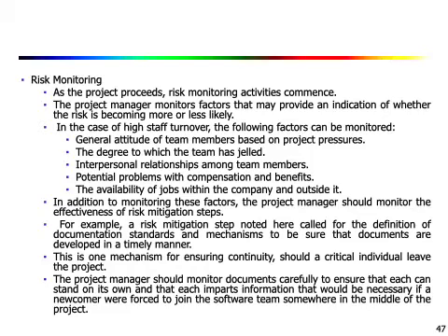This is one mechanism for ensuring continuity should a critical individual leave the project, and the project manager should monitor the documents carefully to ensure that each can stand on its own and that each imparts information that would be necessary if a newcomer were forced to join the software team somewhere in the middle of the project.